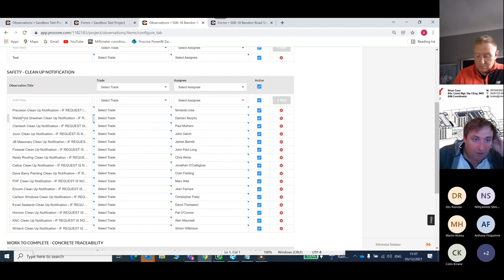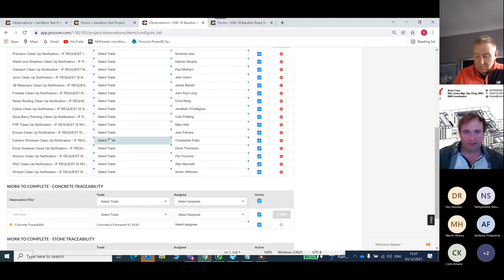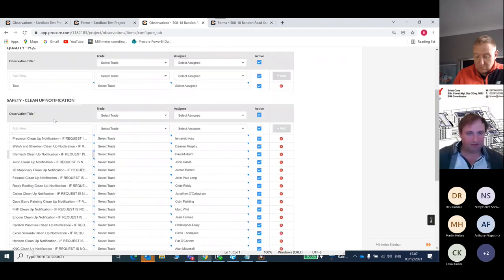So we have 1, 2, 3, 4, 5, 6, 7, 8, 9, 10, 11, 12, 13, 14, 15. So we've 16 contractors, and all we've done is that statement, clean up notification: if requested, it must be complied with in full within 24 hours, otherwise a contra charge is applied. And we just put the name of the company in front. So that's the kind of preparation work that you should try and do.